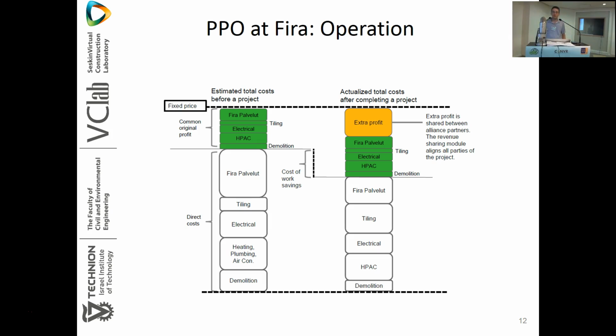If we look at operations, as a reminder, that is the actual work done by the teams themselves. When you have a stable team and you have this intention process, we can start looking at how to improve the individual operations. The electrical team, for example, by their own measure, was able to drop their costs per apartment, per bathroom by 18%. And through the work that they've done with the Alliance, and this is very similar to the IPD chart many people have seen, by reducing the amount of cost, they have extra profit that they're able to distribute among the partners, which is another incentive, which is only enabled by having a portfolio being addressed.